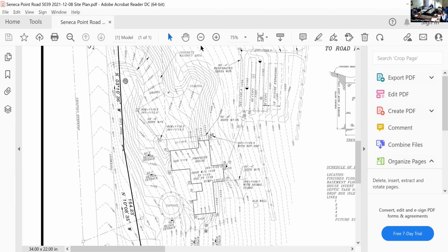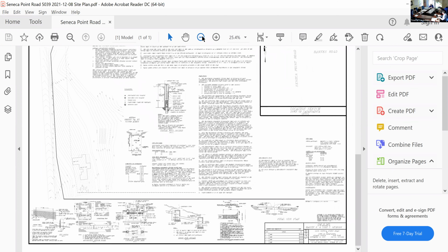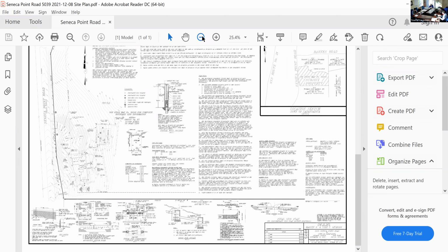Yeah, let's see, seal of your surveyor. They don't have that yet. I don't see one, which technically we can't move forward without the seal. It will be upon approval by town. No, I just looked at his notes, that's all. So you need the seal on there now? Yes, New York State doesn't allow us to accept draft plans without a signature and stamp. Oh, I just realized he had put draft on there because he was gonna do that based on approval. Yeah, we don't do that.